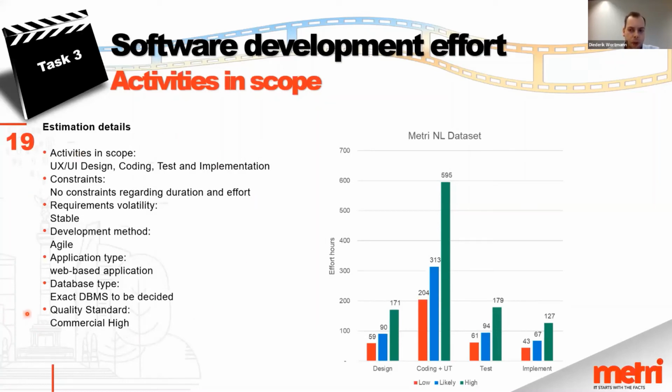And I guess the point here is to make sure your estimation is a probability curve, and make sure you go for a likely scenario instead of just the 50th percentile, which still means you run a 50% risk of overshooting your estimation.